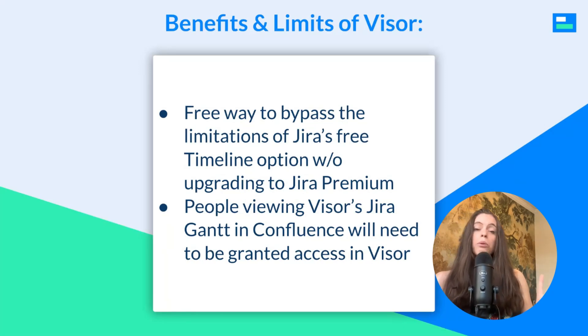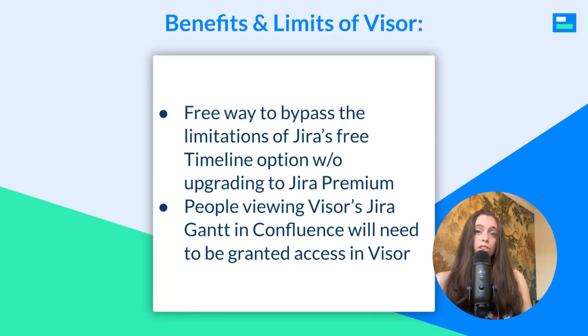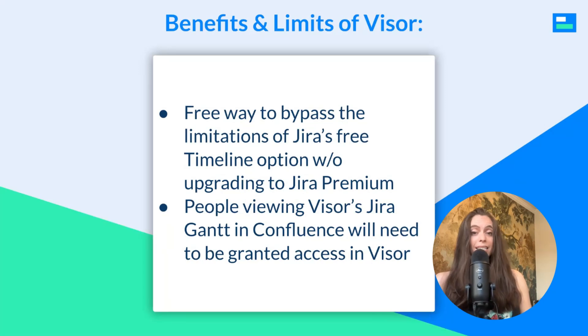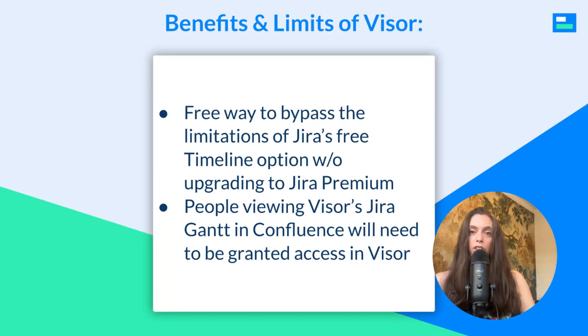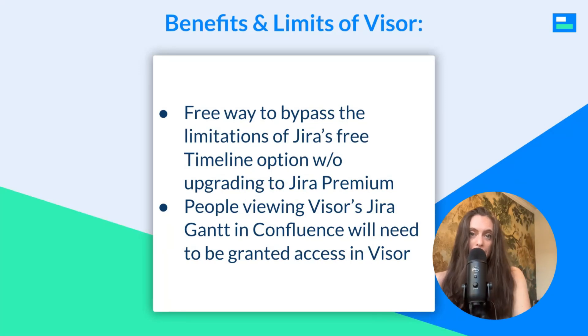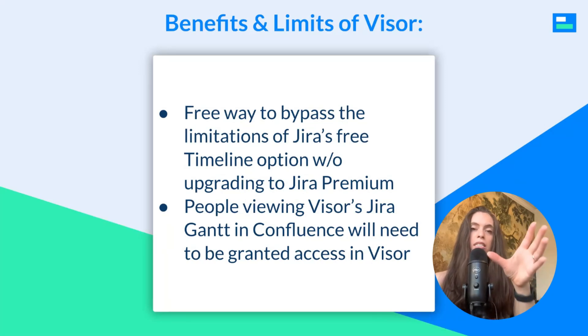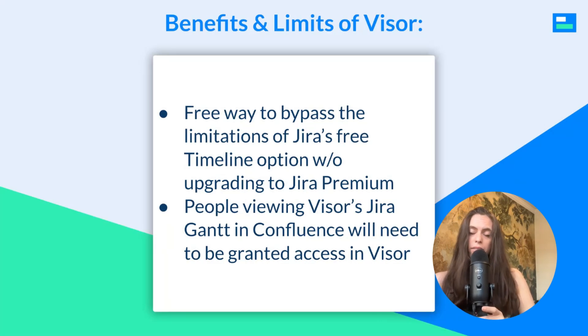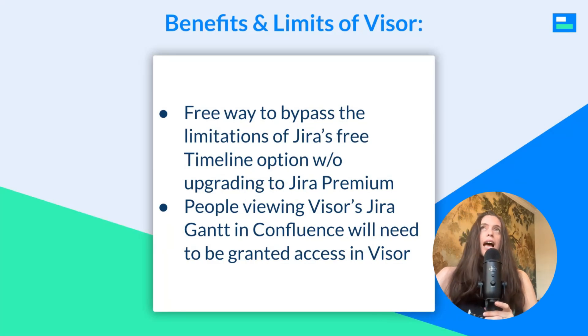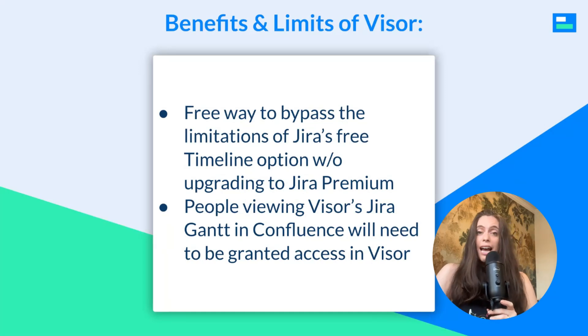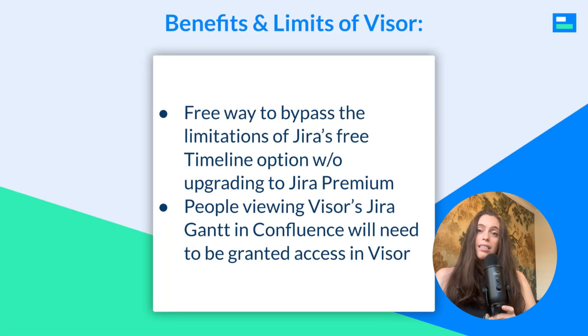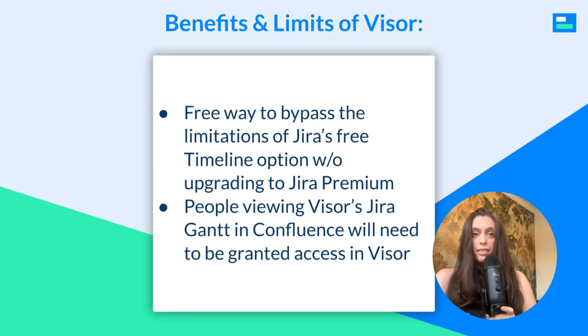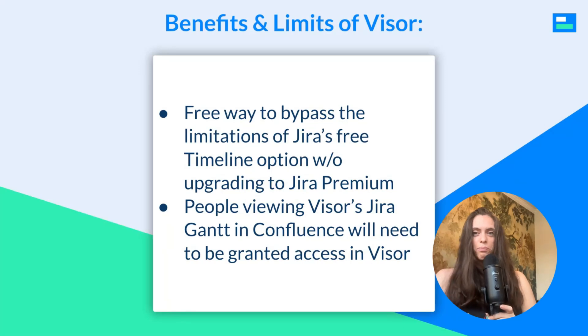I will say one limitation of Visor is that when people are viewing Visor's JIRA Gantt in Confluence, you will need to grant them access in Visor. They're going to have to log in within that little widget in Confluence. So, that is one limitation to be aware of. And other than that, though, you're able to share your project data that's in JIRA in Confluence using Visor.